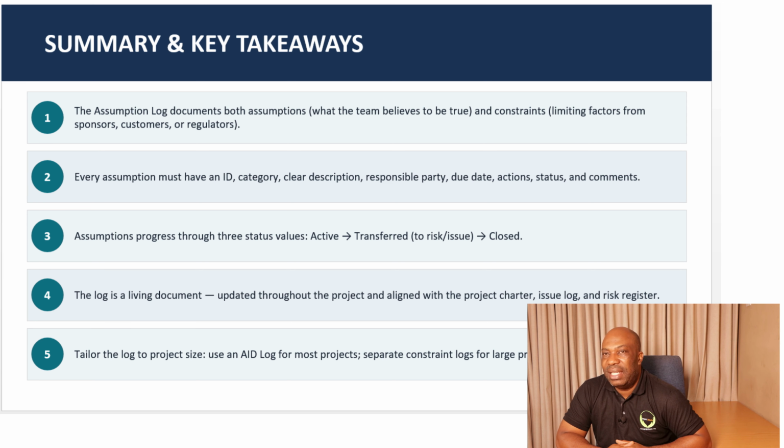Then the second takeaway is every assumption must have an ID, category, clear description, responsible party, due date, action, status, and comments. We have covered these ones. We must always have a well-documented assumption log. Now, takeaway number 3: assumptions progress through 3 status values.